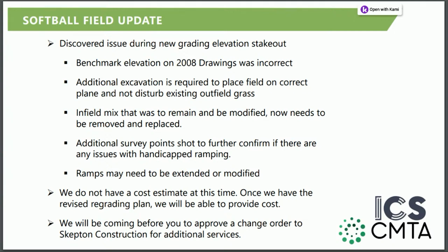We selected this method in discussions with the district based upon not wanting to impact the grass growth that's already in place in the outfield. So that decision was made, rather than trying to level that out, that we would over excavate the infield down and bring it back up.